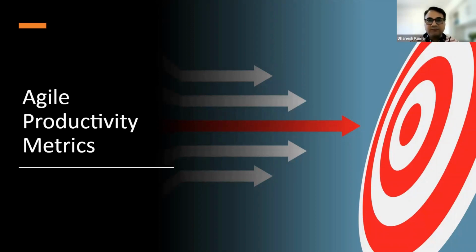So first and foremost, whatever you are working upon has to be represented in one way or shape or form, whether it is a story, a task, or an enabler. Everything should be there, and that should define true work in progress. And the moment we understand the limits of work in progress, that really helps in managing the team's cognitive load in a way that the team will feel happy about it and it will become more sustainable.